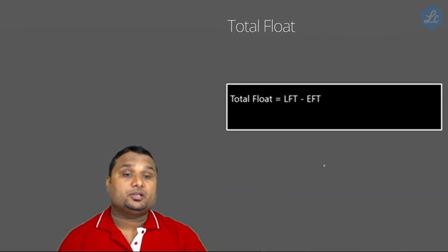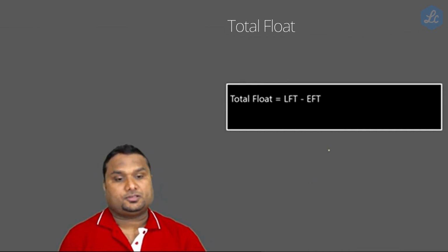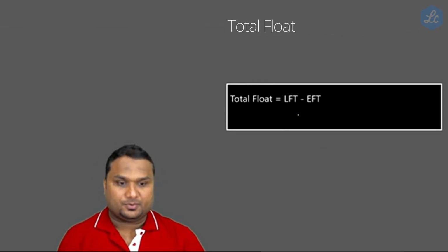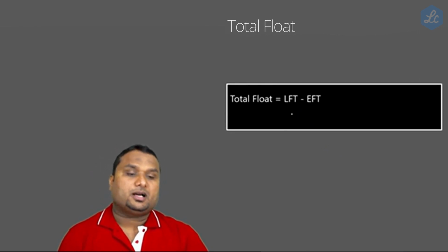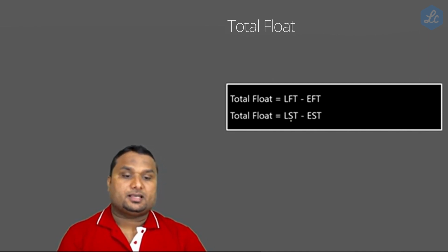And there is something called a total float. How many days can you keep idle? That is the float. How many days of rest can you take in between the project? There are two formulas. One is LFT minus EFT, and the second one is LST minus EST.